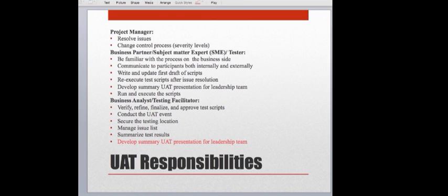They're responsible also for developing a summary presentation for the leadership team and running and executing the test scripts, obviously. And then you as the business analyst, who is probably the meeting facilitator, I always was, you are responsible for verifying, refining, finalizing, and approving the test scripts, conducting the UAT event, right, actually putting on the UAT event, securing the testing location, managing the issues list, summarizing test results, and developing a summary of the UAT presentation for the leadership